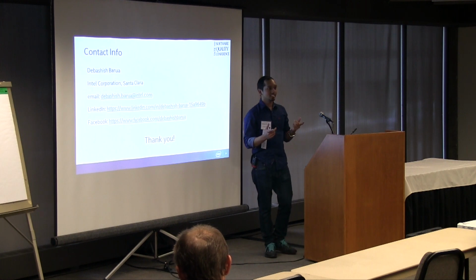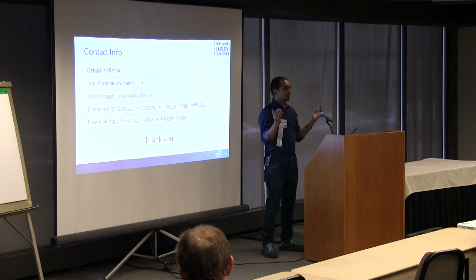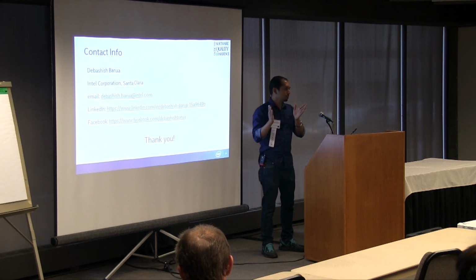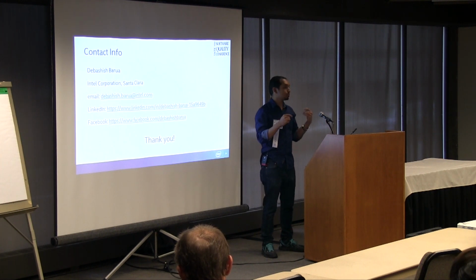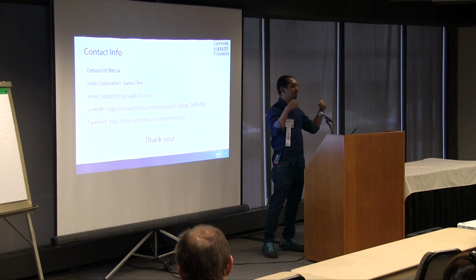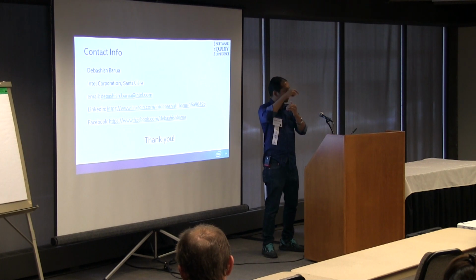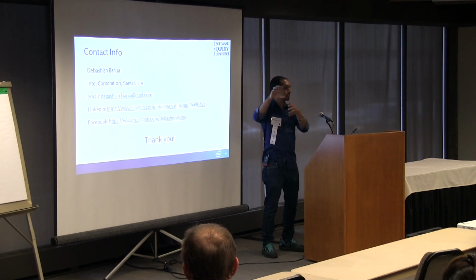What we did, in many of the cases, was separate defects into high, critical, medium, and low. So we try to do our S modeling on each of them as well. So it does work. But the problem that you're going to face after that is that you need to club it again and then say, hey, this is how it trends. But trust me, program managers and project managers don't want to go anything beyond one step. They just want the final number saying I'm going to see this many defects. It may include the open defects or duplicate defects, but this is the total count.